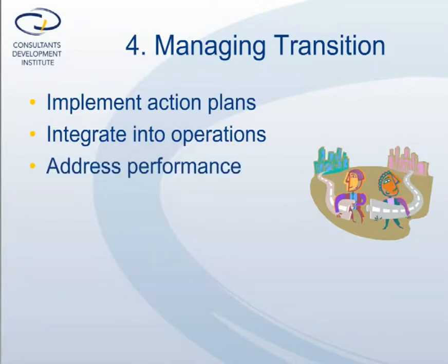Since this is the phase where people might be asked to do more, it's not unlikely that performance issues might arise. For example, people might already be behind schedule on their regular work, which could cause new projects to be even further behind schedule. It's very important to closely investigate the causes of those issues. They might be from lack of resources or training, or from lack of understanding of the project.